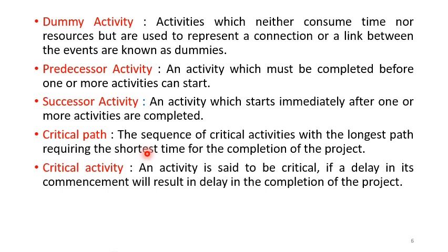The commencement of those critical activities is very, very important, because if they are delayed, then the entire project completion time is also affected. So an activity is said to be critical if a delay in its commencement will result in a delay in the completion of the project.